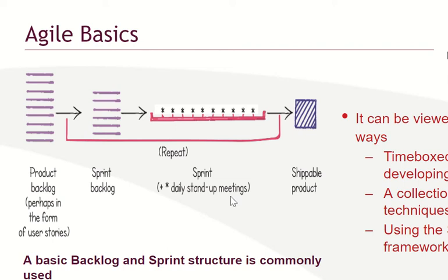And what do you discuss? What you discuss is what was planned to be done a day before, what was done a day before, what is to be done that particular day, and if there is any reason why a particular task that was meant for yesterday was not done, was not started, was not completed.